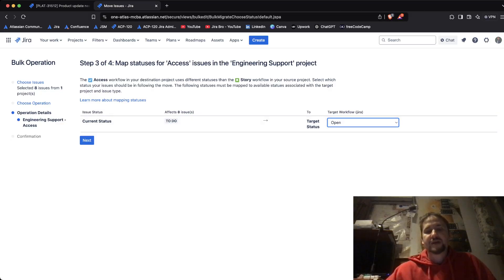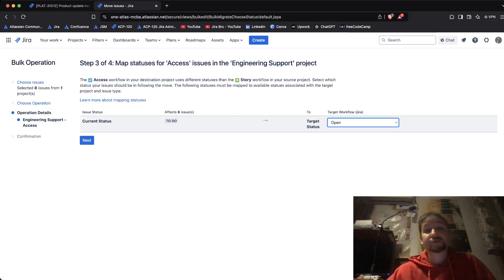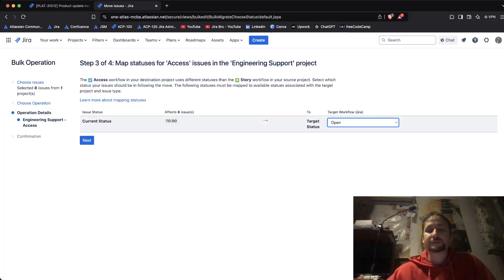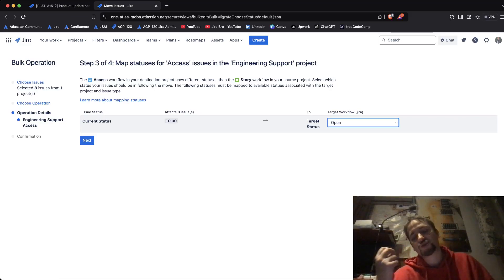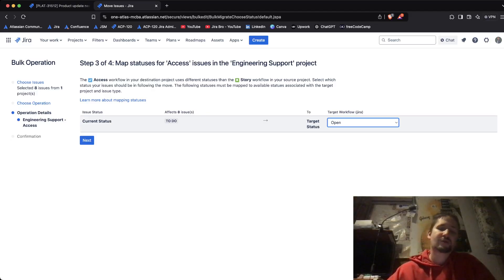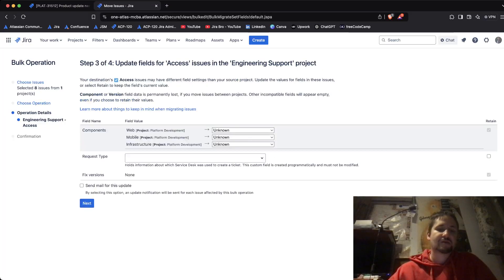It's also going to ask what the current status mapping will be, because you need to determine what the new status of these issues is going to be. That's why bulk moving issues between projects can get tricky. So from To Do to Open — when you have the To Do status category, you want to make sure that the target status is within the same status category so you don't create any confusion. Then click Next.